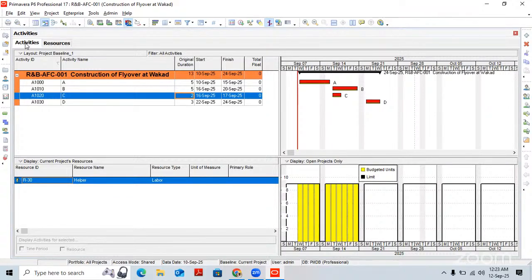You can extract this information into Excel. Usually we have to do this during our reporting, as we have multiple projects within a city. So we come to know that we have so many laborers and so many helpers, and we plot the graph and set the benchmark for the project.